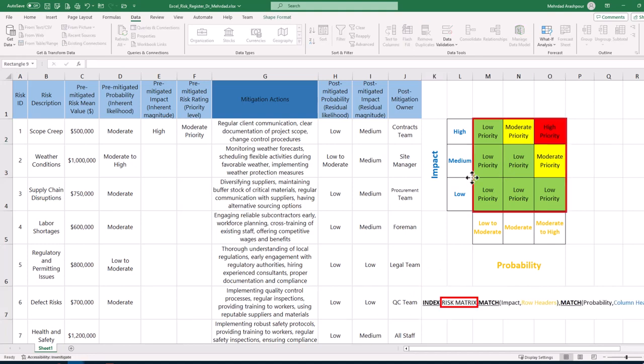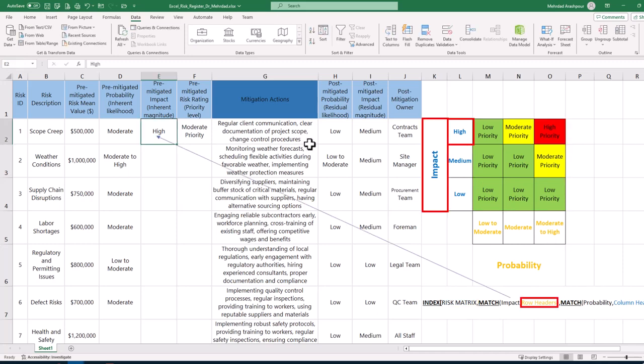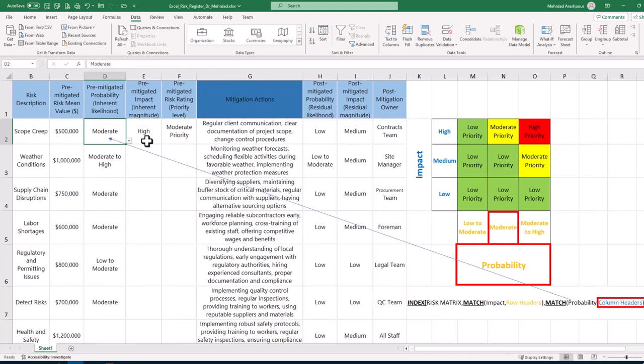We can use index function of Excel to retrieve risk ratings from our fever diagram or risk matrix. Then match function in Excel is used to match the identified impact of risk 1 with the row headers or impacts in our risk matrix. Similarly, match function is used to match the identified probability of risk 1 with the column headers or probabilities in our risk matrix.